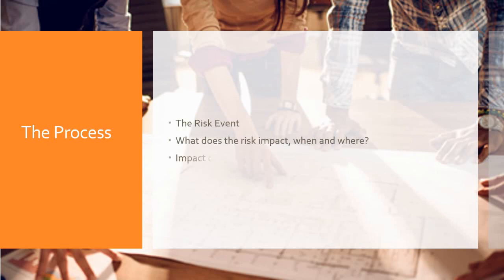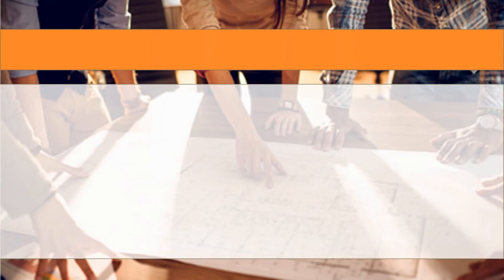Initially, we look at our project information and identify all the uncertainties in the project and the corresponding part of the project that they impact, the risk event and the impact of that event. During the first run-through, we focus on the identification and not on doing an in-depth analysis or providing all the auxiliary information. So how do we identify risk?